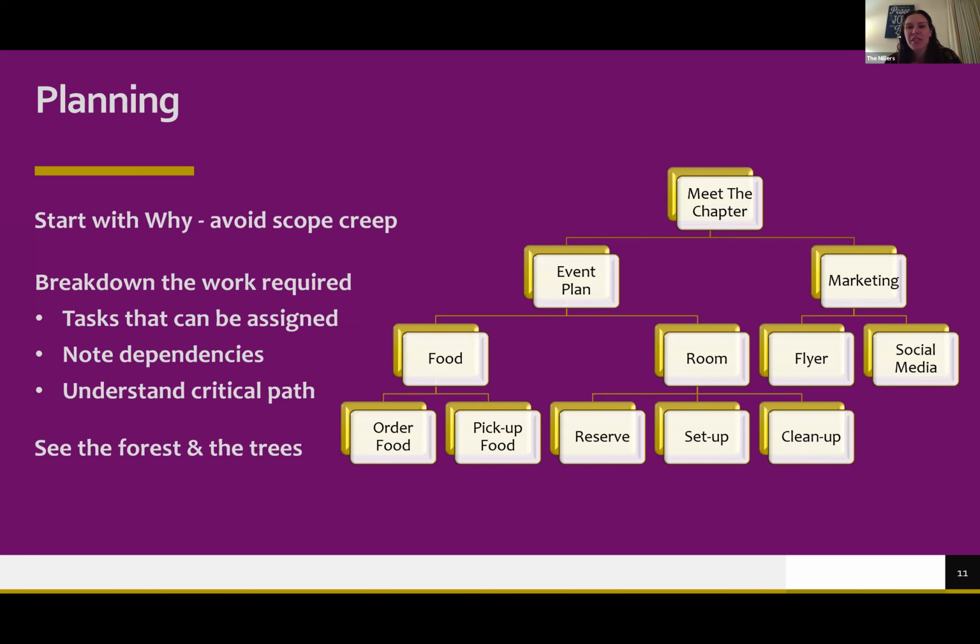And in projects, there is typically the ability to go to change control. What that means is you go back to your corporate leadership team and say, hey, they want to add this scope. The business or the customer expects it to have a positive impact on our bottom line. Do you want to approve this? It's essentially a mini project that you roll into your project, but it has to get approved before you can just put it in your project. At that point, you re-baseline everything. But hopefully our chapters aren't re-baselining things on a regular basis.